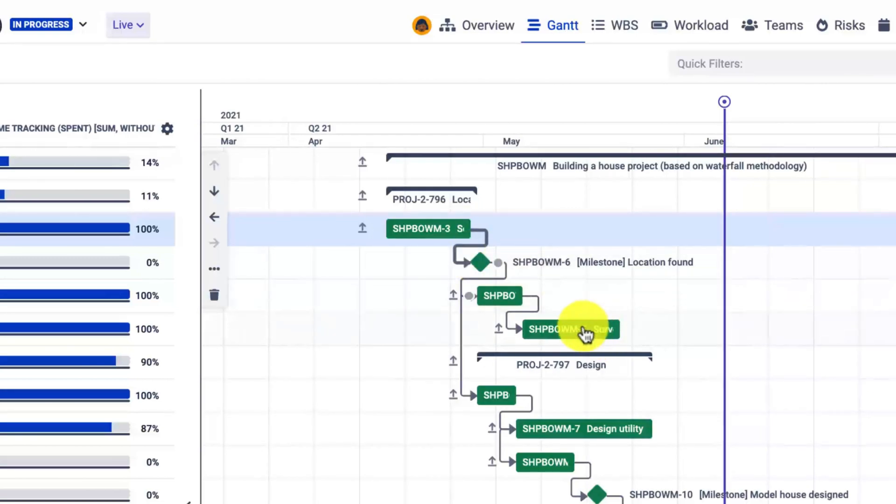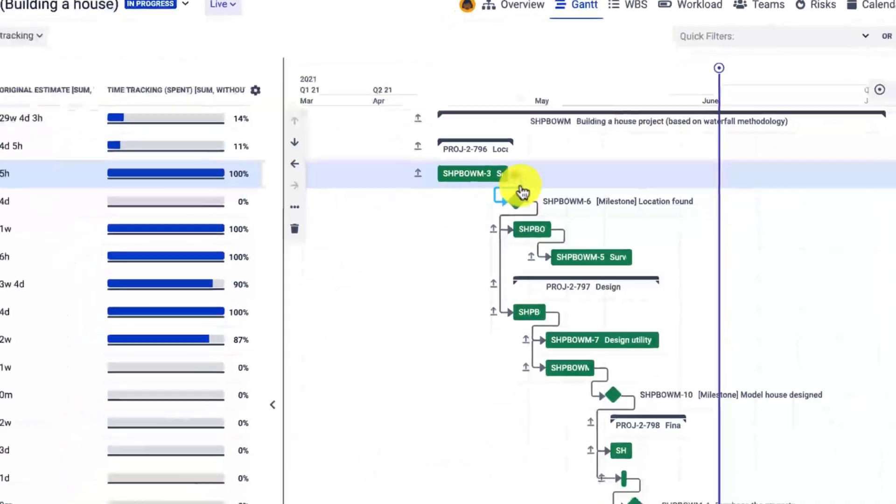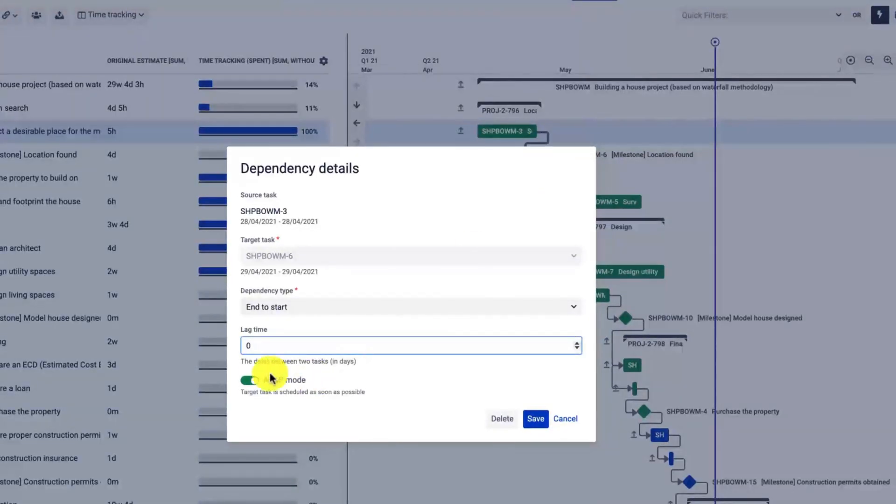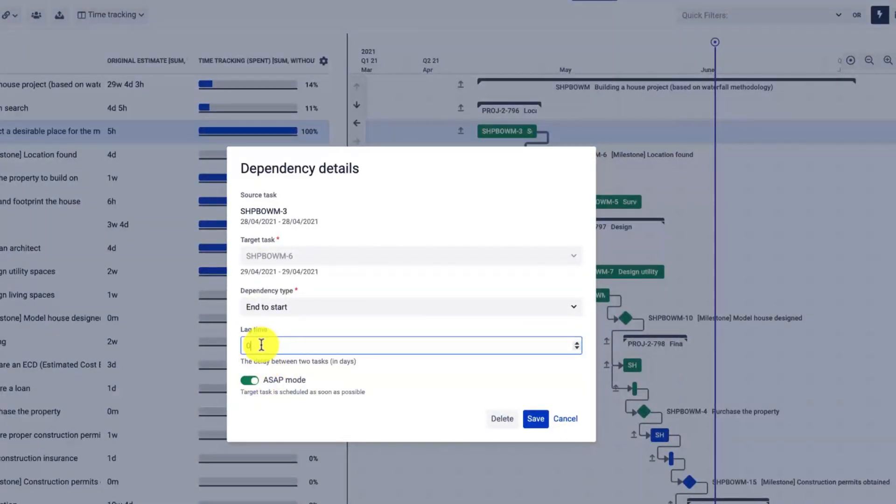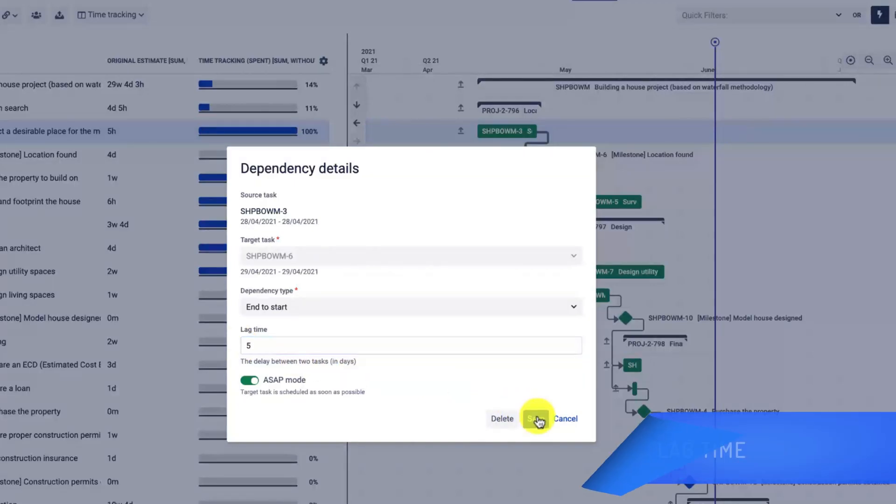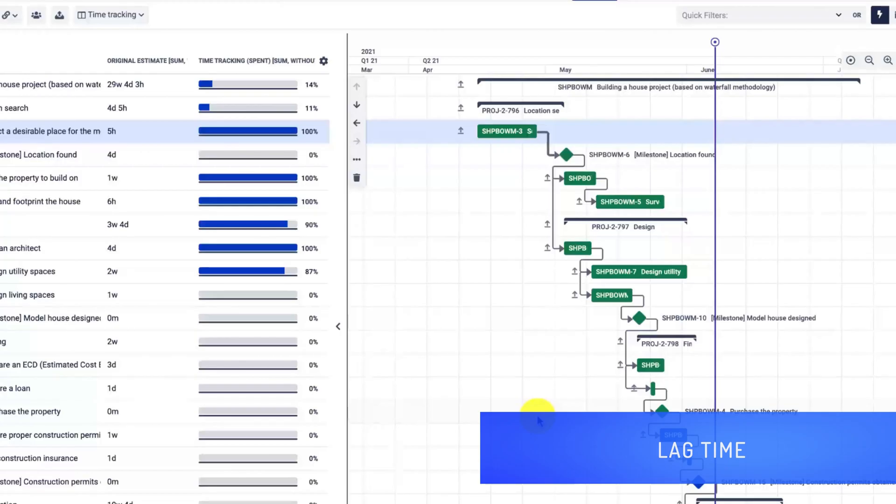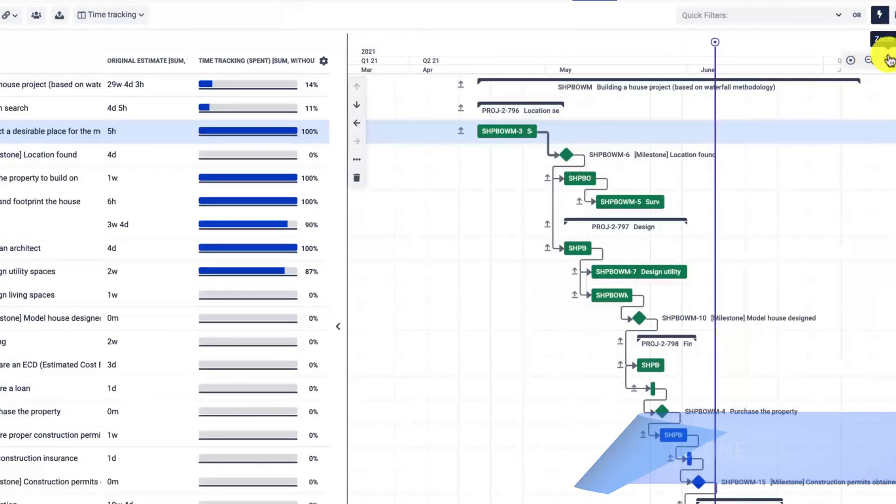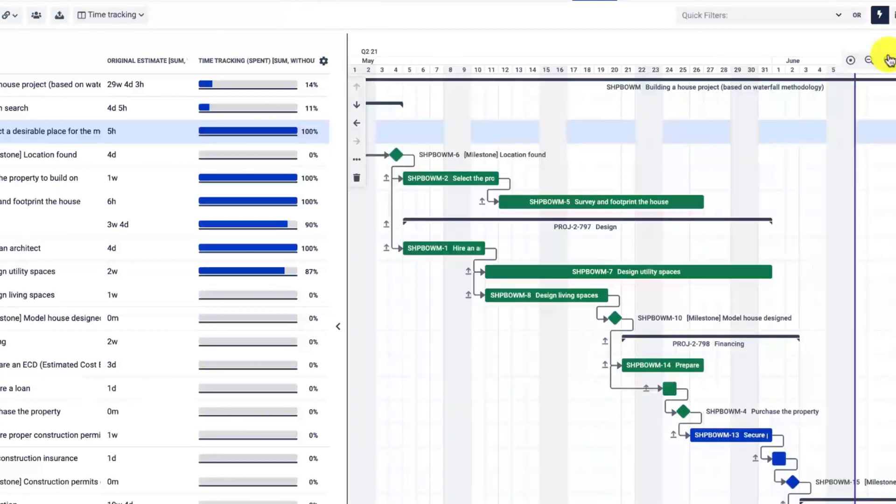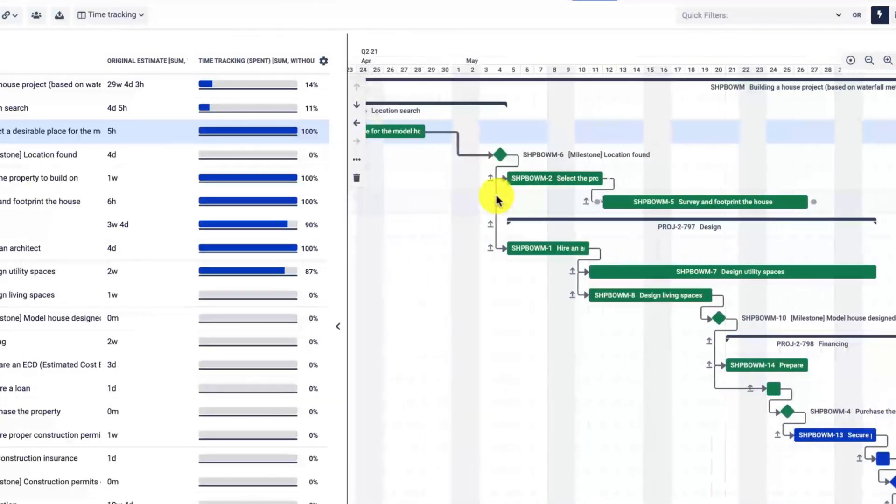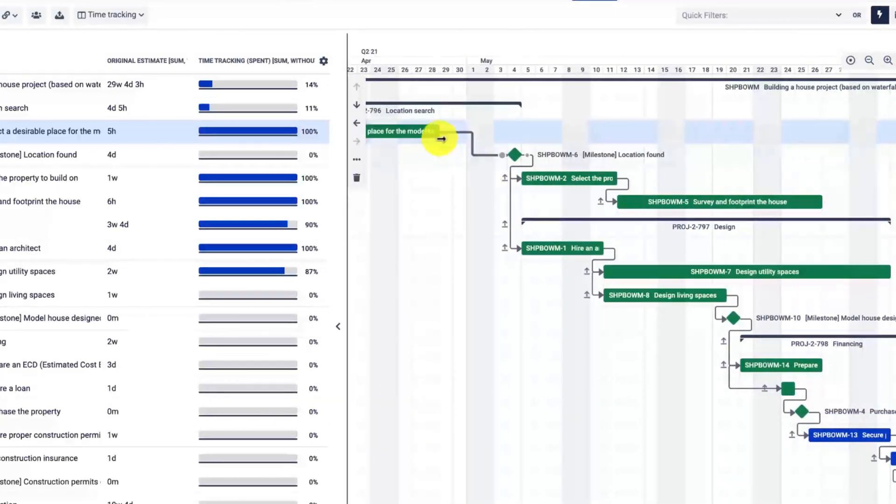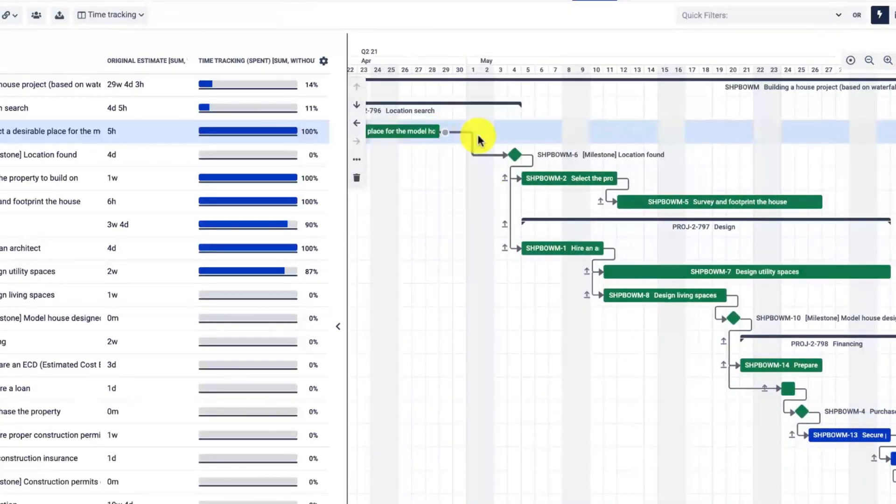I can also disable the as-soon-as-possible mode. In that case, the successor—the connected issue—will not be dragged back. Also, the lag time adds a gap between the tasks. In my case it's set to five, so it's five days. It includes the non-working days as well.